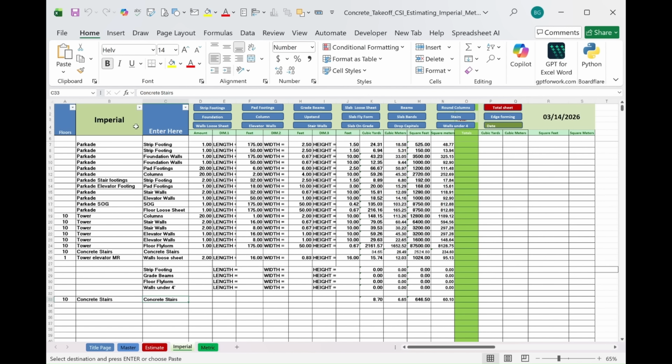Column A is your floor multiplier. On a repetitive high-rise floor cycle, same slab, same walls, same columns, repeated floor after floor, enter one typical floor completely, then use column A as your multiplier. Change one number, and the totals update automatically across the entire row, in both imperial and metric. This makes it straightforward to handle tower floors, repeated beams, or identical stair cores, without re-entering data for every level.